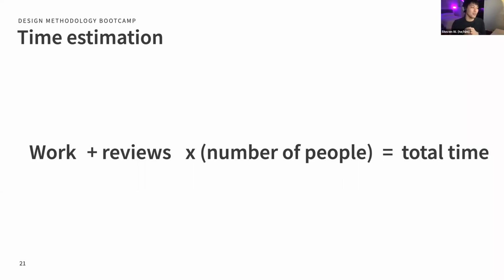Yeah. Times the number of people. If you have more people, you're going to have more check-ins, right? If you also have a bigger amount of people, you actually have smaller check-ins to get buy-in, and then you trickle it outwards, right? There's a strategy behind it too. Equals the total time something's going to take.